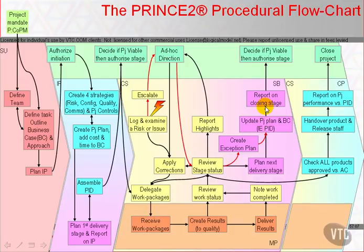The stage is summarised in an end stage report, and the net result is that the project board considers a revision to the project initiation information on which they authorise the project, and a stage plan on which they may authorise a replacement stage. Exception plans always run from the point of exception to the end of the current stage.